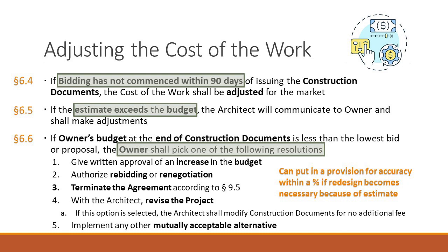And then the last one was to revise the project program, scope, or quality. And that's what we ended up doing. We went back and we said, we can't afford this price for this project. What can we do? There were multiple structures in the project. So we had to take one structure that was a 4-story structure and reduce it to 2. We also had to take some of the more aesthetic, artistic elements of the design, because it was a production facility, and eliminate those. So we had to change the program in order to make sure that we remained within the budget.